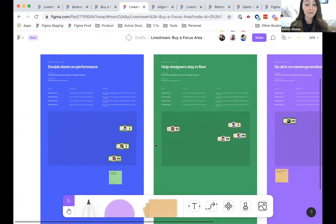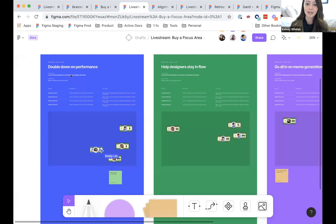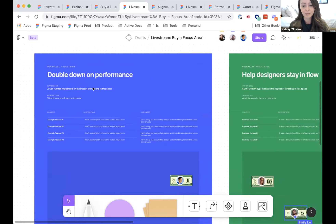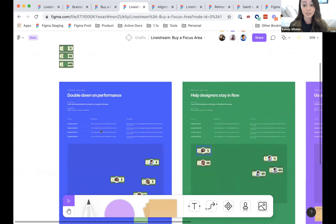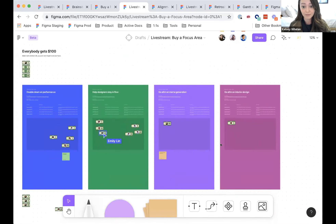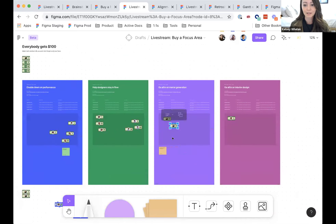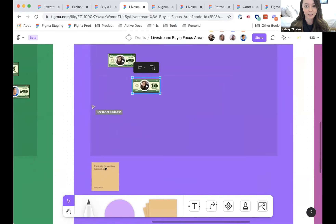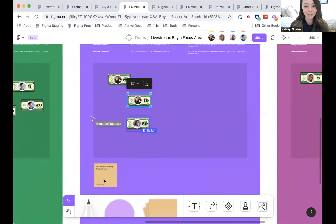Sometimes I like to do 'Buy a Focus Area' instead of just 'Buy a Feature.' I'll create little presentation cards that say: here's a potential focus area, we can double down on performance, a hypothesis about how this would impact our business, a description, and maybe some example features. Then you can see people starting to put money where they think we should invest. It's also nice when people add comments explaining why, like a little post-it note.